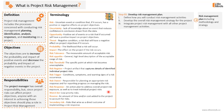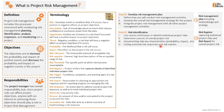What are the key steps when dealing with project risk management? We start with developing a risk management plan, where we define how we will conduct risk management activities throughout the project. We develop the overall risk management strategy and methodology and ensure project risk management is integrated into other project management activities. The key outcome is a risk management plan including the methodology, strategy, roles and responsibilities, timing, budget, and reporting — and this plan will be a subsidiary of the project management plan.